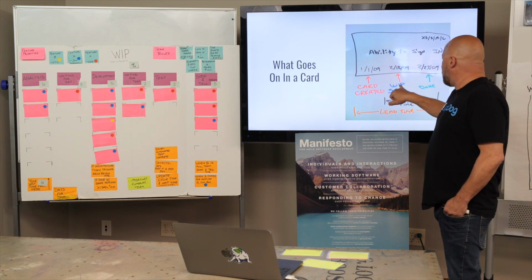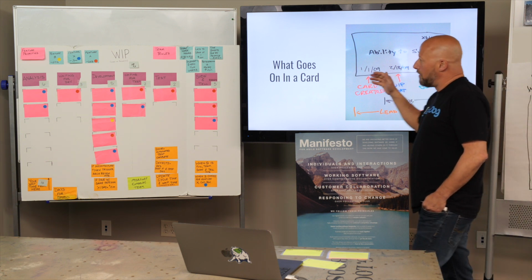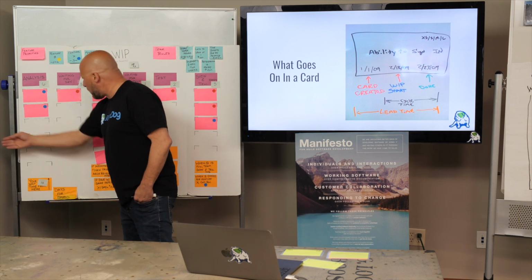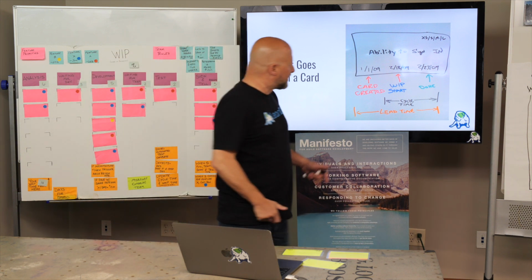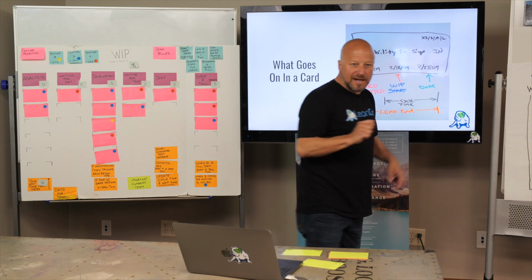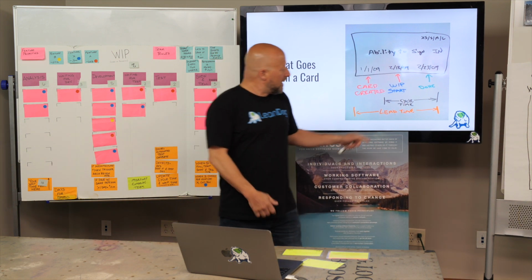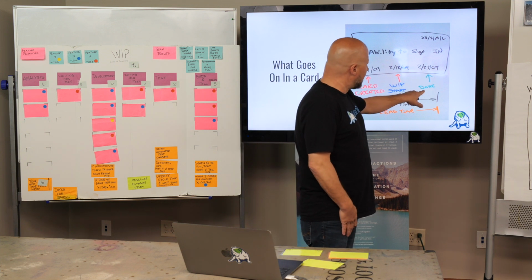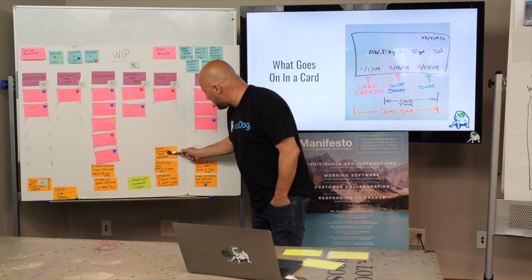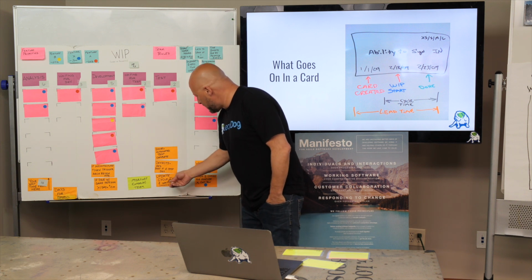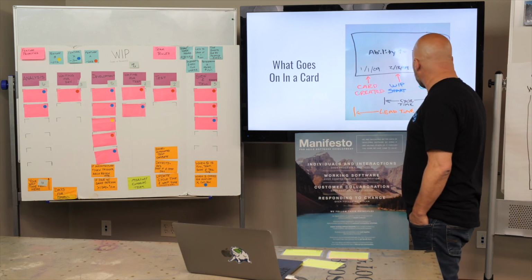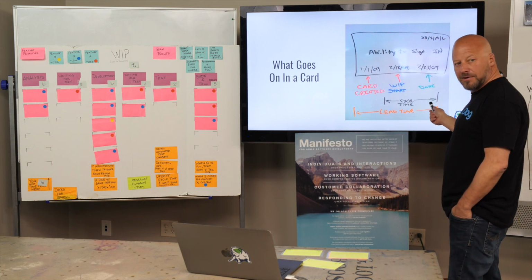Okay. We now have a WIP start date. So over here in the analysis column, there's a post-it note down here, and it says, whenever a card comes into this column, you're supposed to write the date in the middle of the card. Okay. So we're tracking now, when did it actually get to our WIP board? Okay. Over here, we have a done date in the bottom right, and that happens over here, right? Over here, when done is automate test complete, there's a note that says write the date in the bottom right-hand corner of the card and update the cycle time, okay?